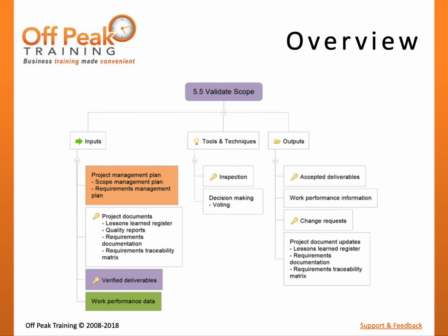This process should always be performed at the end of a project as well as at the end of major phases that require acceptance of deliverables to move to the next phase. Since verified deliverables are an input to this process, it can be implied that this process will generally happen after the control quality process. It is important to understand the relationship between the two processes.